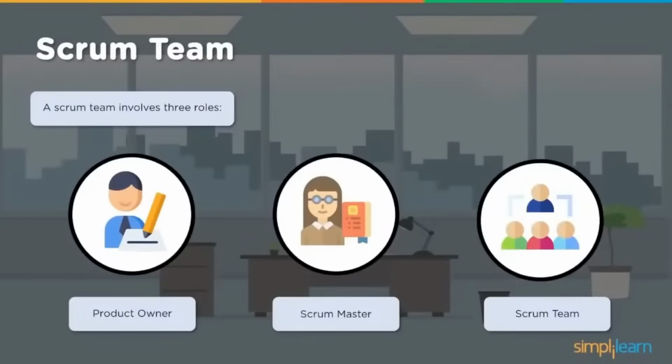Then the Scrum team involves the product owner, Scrum Master, and then the Scrum team. Each of these is a different role having its own objectives to accomplish with specific directions, and these cannot be merged. For example, the roles and responsibilities of the product owner cannot be given to a single individual who is a Scrum Master. So both roles cannot be given to a single individual because it conflicts with the objectives of both roles. Thinking about making one of the team members the Scrum Master or product owner will also not work, and will not give the required results.